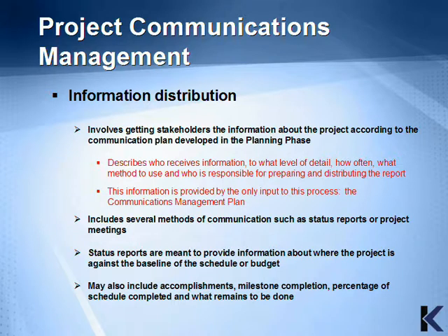This information is provided by the only input to this process, the Communications Management Plan. It includes several methods of communication, such as status reports or project meetings. And status reports are meant to provide information about where the project is against the baseline of the schedule or budget. It may also include accomplishments, milestone completion, percentage of schedule completed, and what remains to be done.